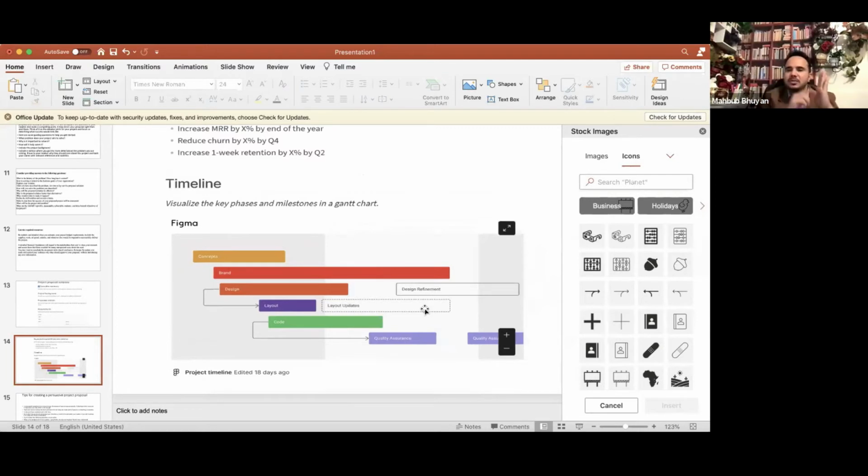If it is 9 months, 9 months will end here. So 1 to 9, you will divide this. If it is graph paper, you can divide it by 1 month or even by 15 days. Then you can write it this way. The first chapter will be done in, say, 2 months, and 15 days after the start of the first chapter, I will start my second one, and that will go beyond this, for 3, 4 months, 6 months.